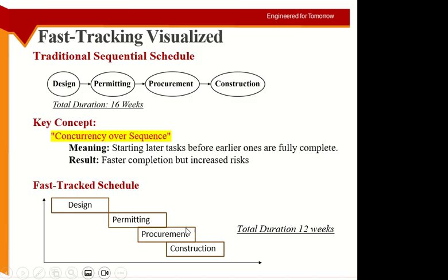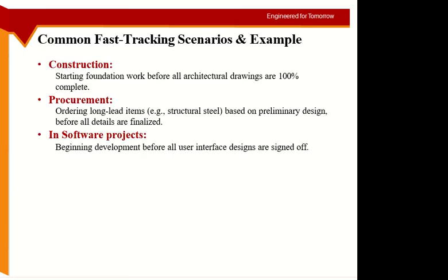Okay, so this parallel thing is what is saving your time. So maybe you are saving 2 weeks of parallel work here, 3 weeks of parallel work here, and so forth. So this is how you compress the project to a lower duration.